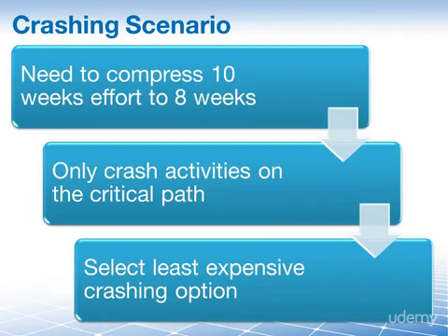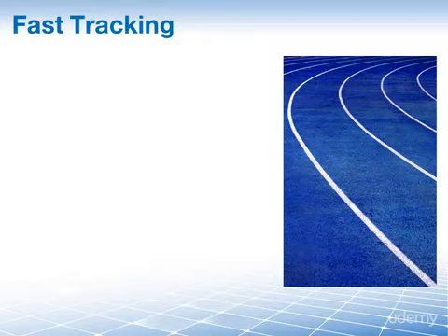Well, the answer is simple. You choose the cheaper one, of course. So remember, when answering exam sample questions, that you always crash those activities that are cheapest or bring the most reduction at the same price first.